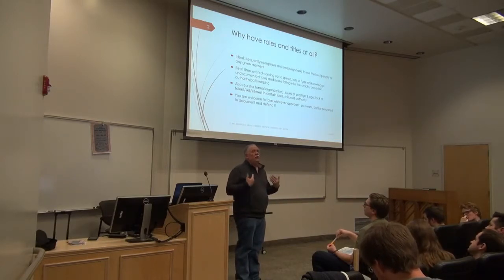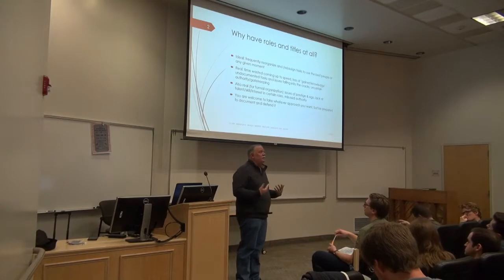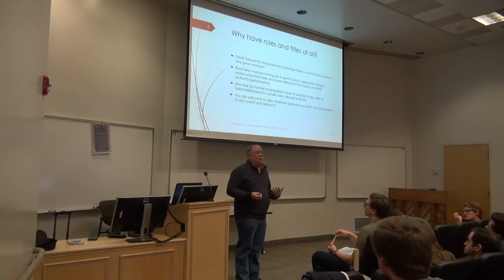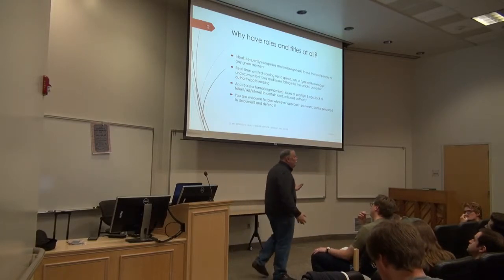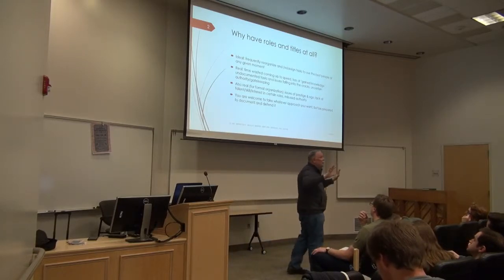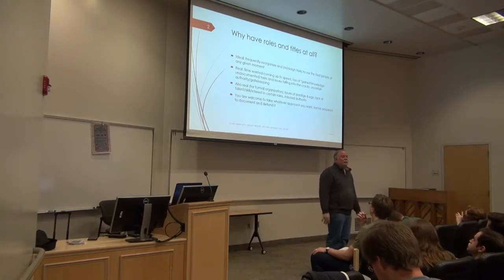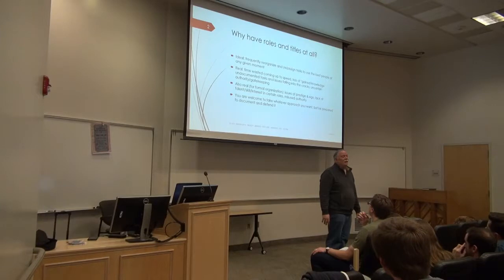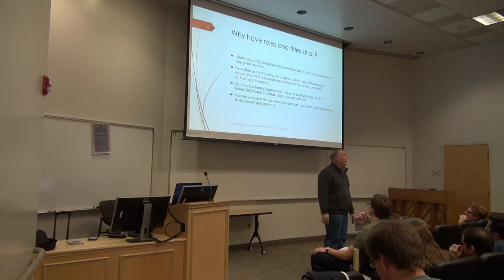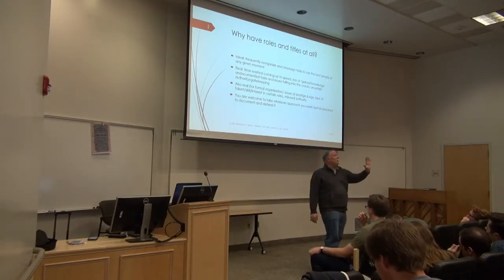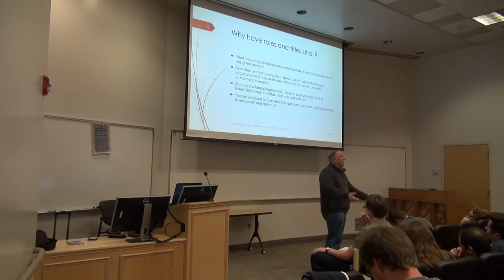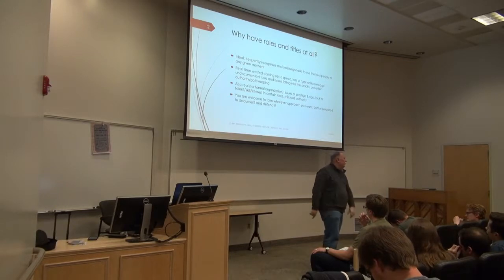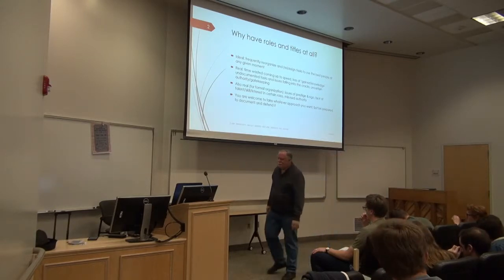We tend to push off all the hard problems. It's another reason for that 90-90 rule. We do all the low-hanging fruit, we do all the easy stuff, and we're pushing off all the really hard stuff. And then you get towards the end, and suddenly you've got half a dozen really hard problems. And sometimes you've coded yourself in directions that make your solutions for them mutually incompatible. You start unwinding and backing up. Yeah. It was basically the same one.